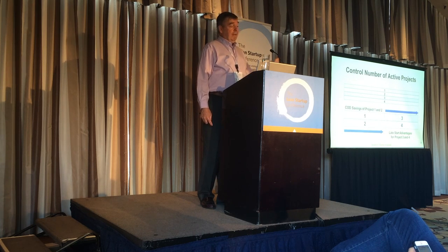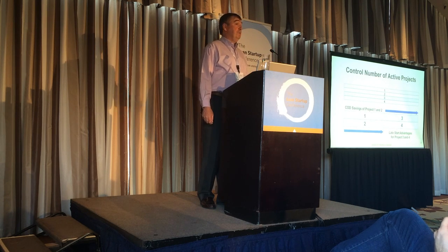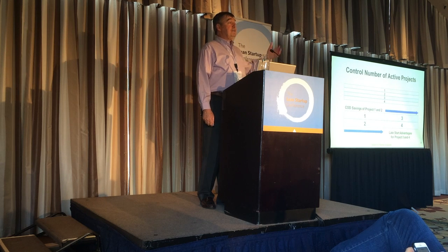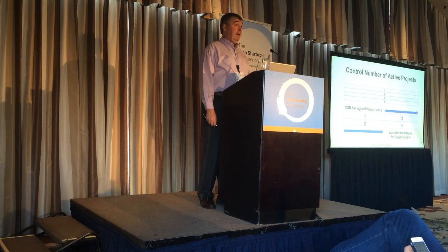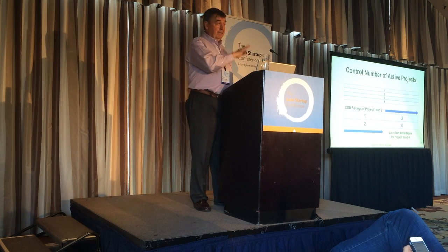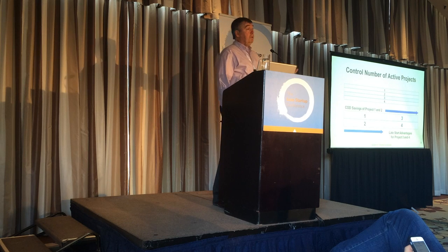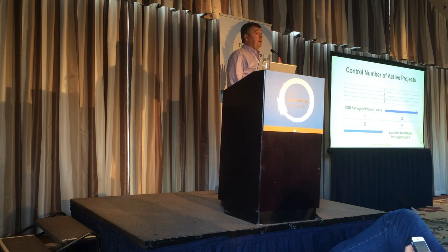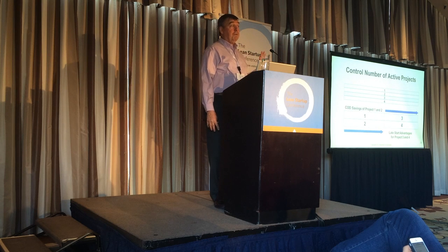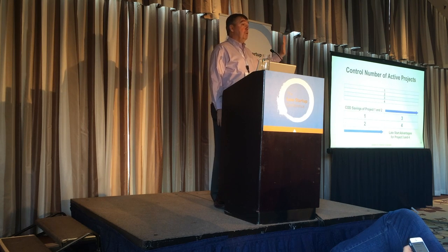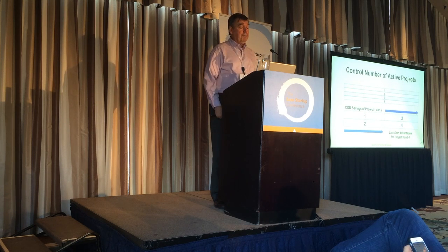If the planes are landing at JFK at 20 planes an hour, putting more planes in the air as a way to make them land faster is not really a good strategy. All it means is the planes start falling out of the air in the process. So now there are also advantages for Project 3 and 4 because when you pull the trigger at a 12-month time horizon from product launch versus 24 months, you have better requirements, you have more mature technology, you have learning you can get from Project 1 and 2. So there's lots of arguments for that.